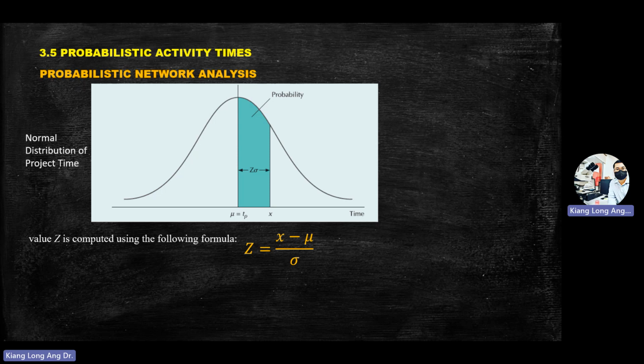So yesterday we learned about the two methods, and then we learned about critical path. Normally what you do is that once you have the critical path time, let's say 9 months, your x normally will be put in the critical path time. This one is at the center. This one is mu at the center. Where is the center of your statistic data? Sigma is the standard deviation. Okay, sigma you calculate from the square root of b minus a divided by 6, squared.